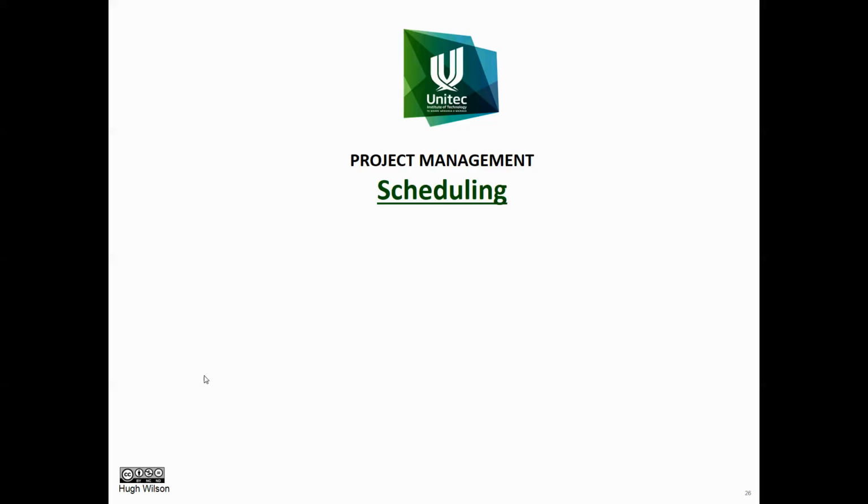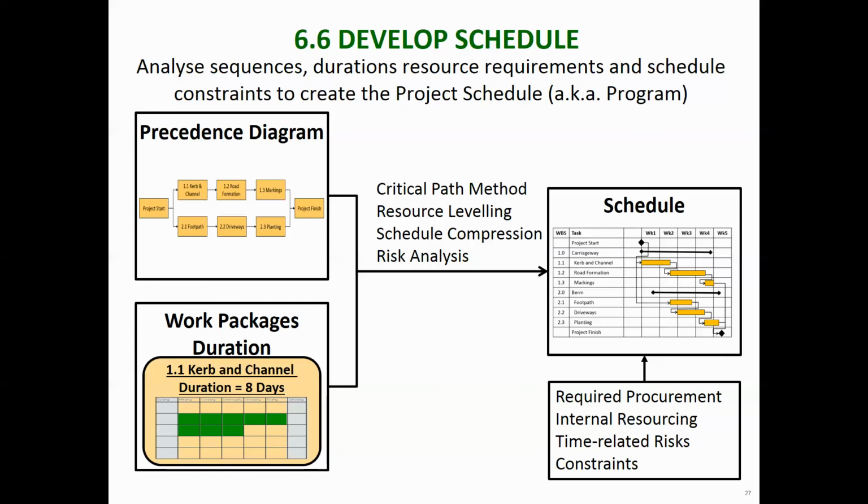Okay, in this video we're going to look at scheduling. This is the last step in the time management process. Developing the schedule involves taking the precedence diagram, which we developed in the sequencing process, and the work packages, resources, and durations, and putting them in as well.